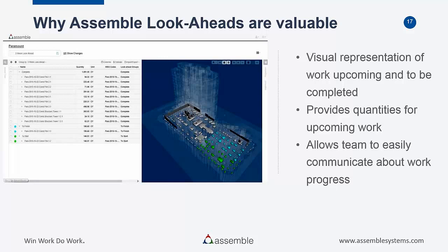If it was to finish in the next 3 weeks, then it would classify it as to finish in the next 3 weeks. And then the other option would be that this item expands this 3 weeks, so it's going to be continued to be worked on in this 3 weeks. And then we just run a filter to color code these elements in the model so we can visually show our team the work that they're supposed to be working on.